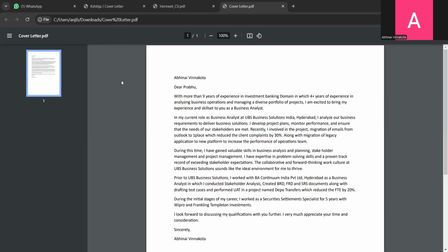If it is a big user story, an epic, and one is picking that epic and wants to complete that epic, which consists of 8 points, right? So it just depends on the complexity points. We go as per that. A person should take 8 complexity points per sprint. Our sprint lasts for only 2 weeks.